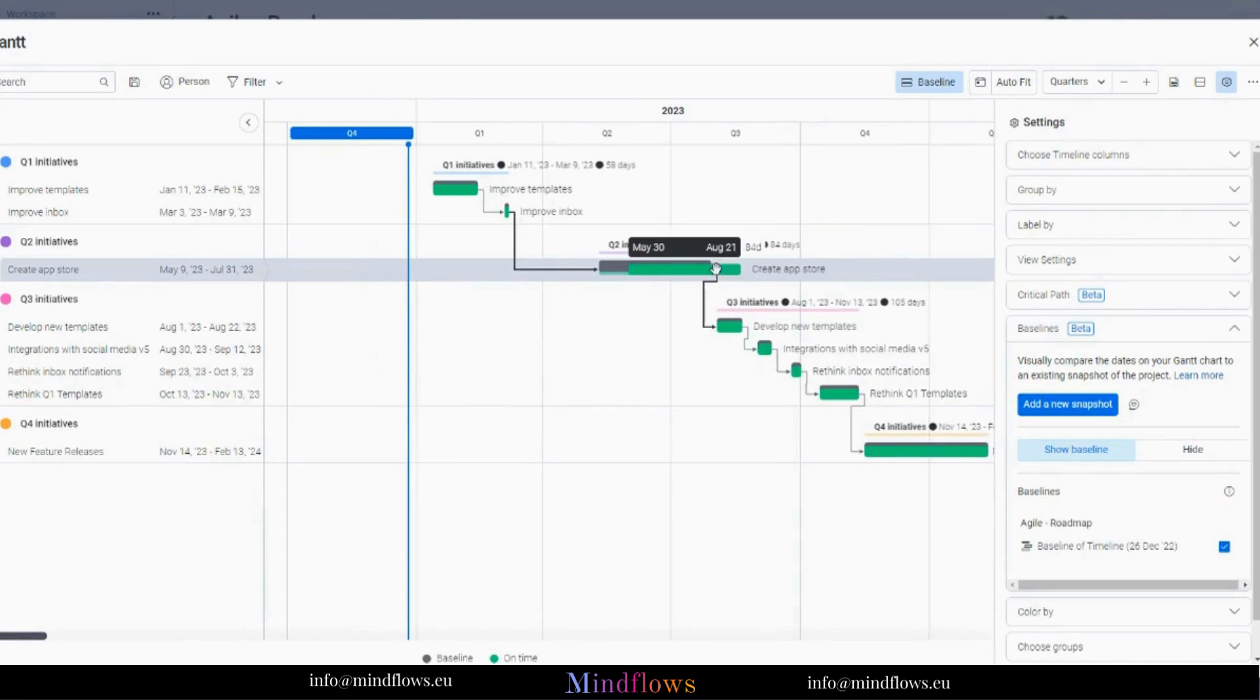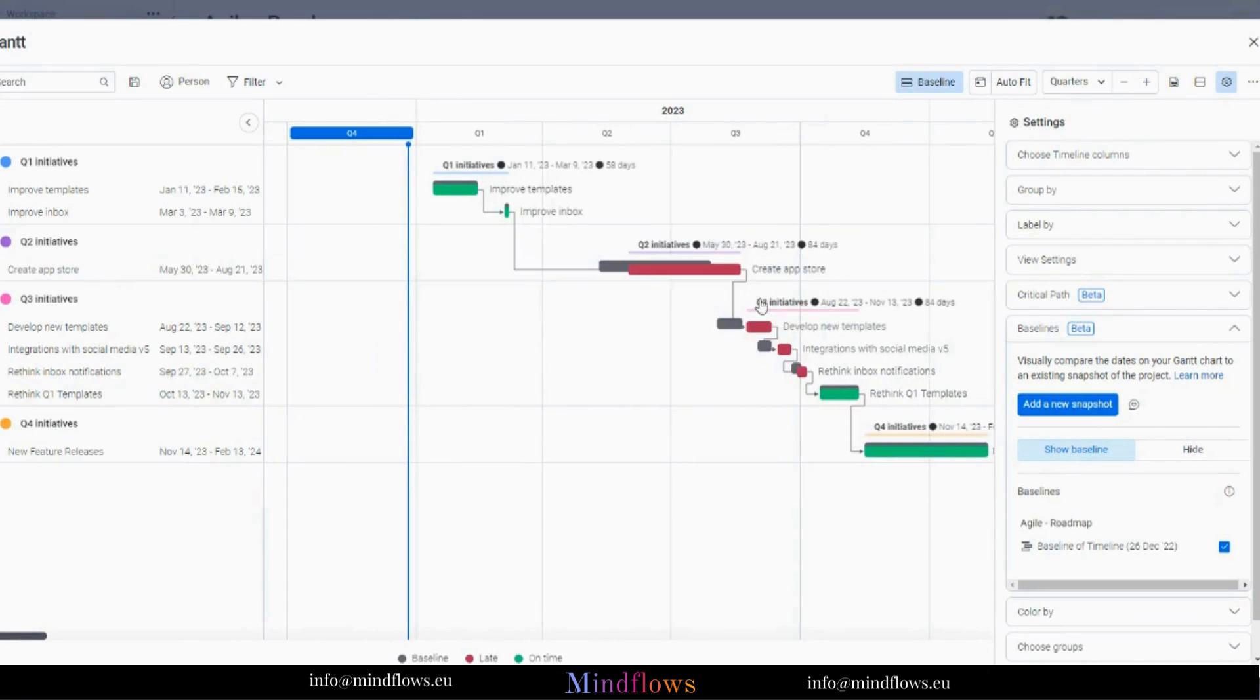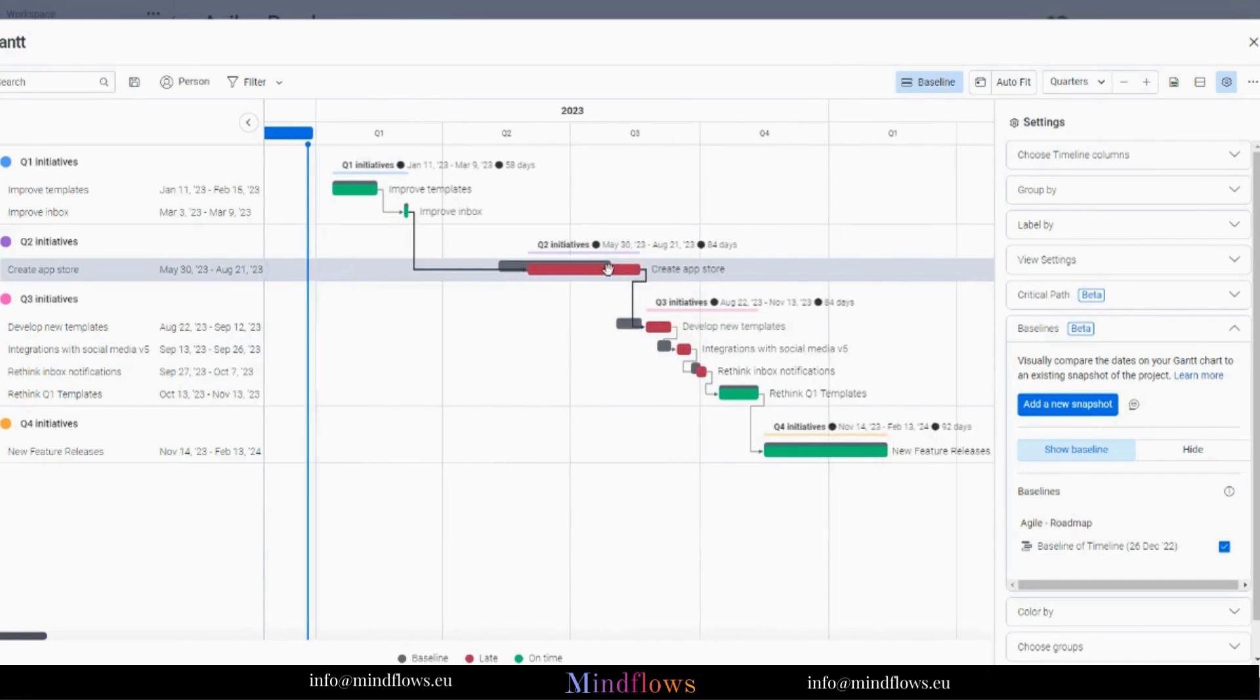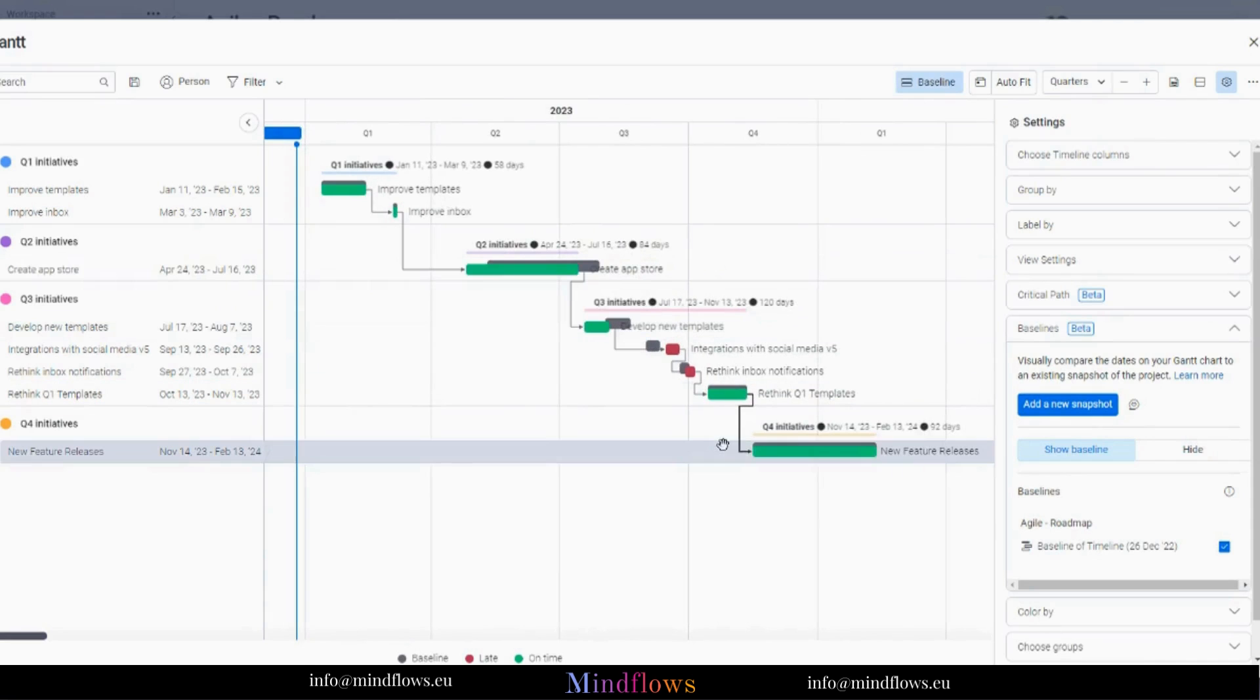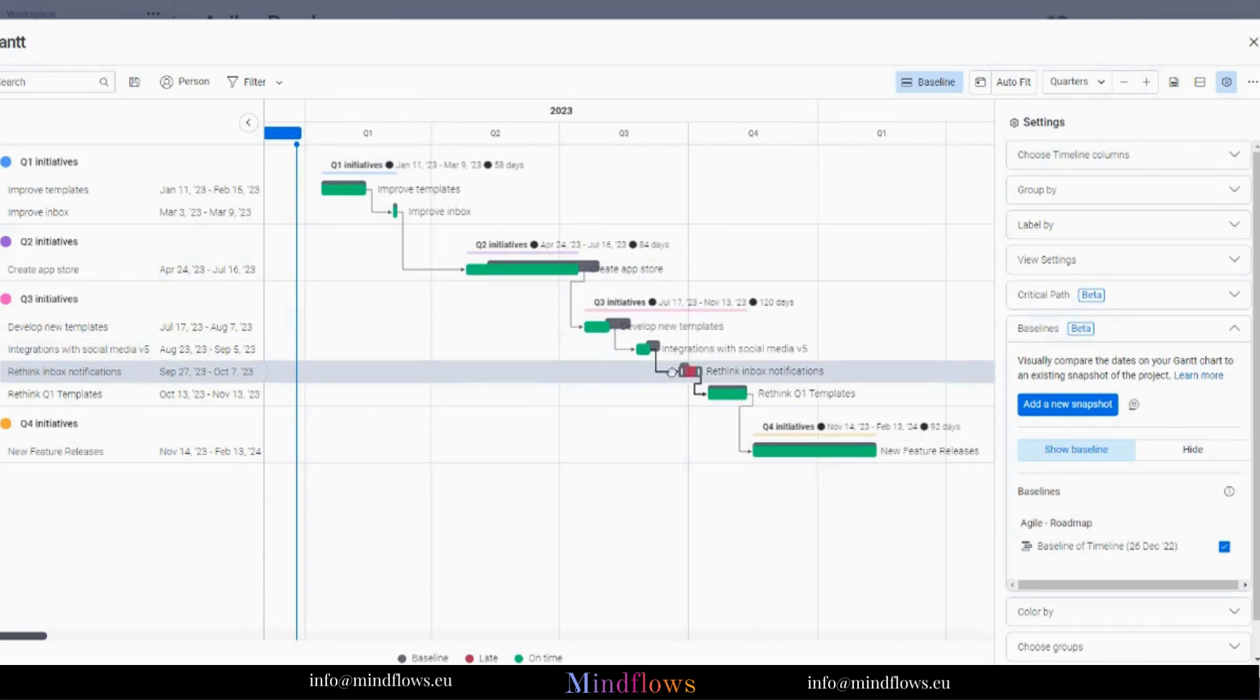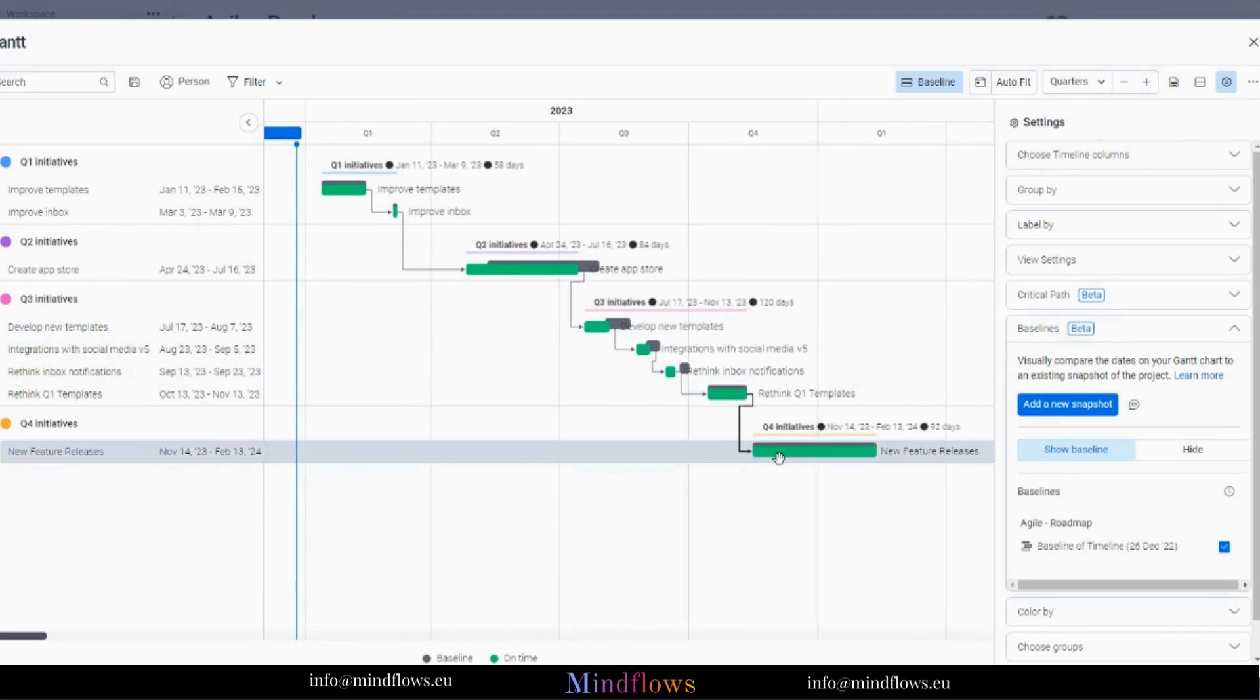Items are displayed in green when a project is on schedule. Items turn red along with any dependent items when a project is delayed and the timeline bars are extended. The baseline photos will appear above the items as a gray shadow, providing a thorough overview.